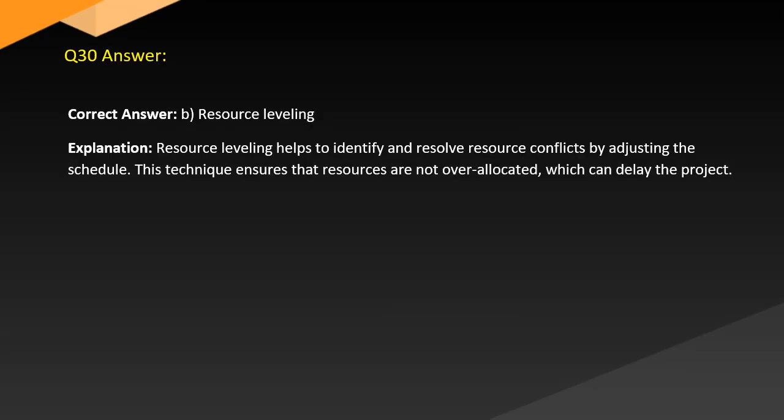Answer. Correct answer B. Resource leveling. Explanation. Resource leveling helps to identify and resolve resource conflicts by adjusting the schedule. This technique ensures that resources are not overallocated, which can delay the project.